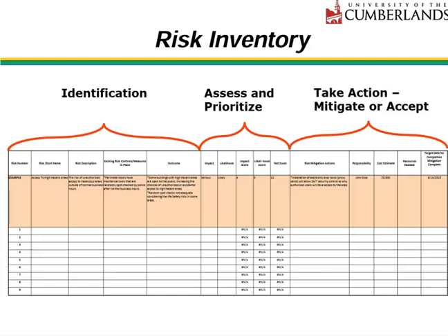The outcome: note that some buildings are open to the public, increasing unauthorized access chances, and that random spot checks aren't sufficient given the life safety implications. Impact is rated serious with a score of 4. Likelihood is rated likely with a score of 3, which gives us a net score of 12, which means that this is a significant risk that requires attention.